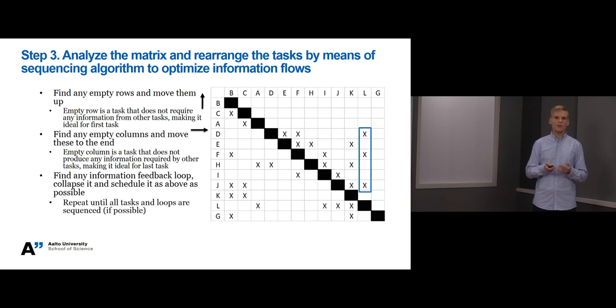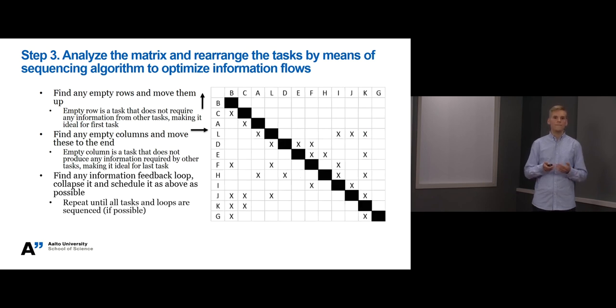Next we can see that task L produces information to tasks D, F and J. So we should move it before them to move the cross marks closer to diagonal and below it, and to minimize any information feedback loops. From now on you continue with the same logic. The key idea is to continue identifying these information feedback loops and eliminate or minimize them by moving tasks in the matrix.